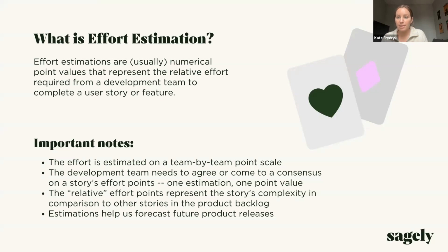Our team's estimates are not going to be the same as the other team that doesn't exist today, their estimates when they come in and start engineering. Our estimates are unique to our individual team. And if we have one new person that joins the team or one other person that leaves, our estimates might change, so they're very fluid and we need to be receptive to that. And we are not going to go further back than the previous 3 iterations when we're looking at our velocity when planning, because we know that things change and we need to be fluid.